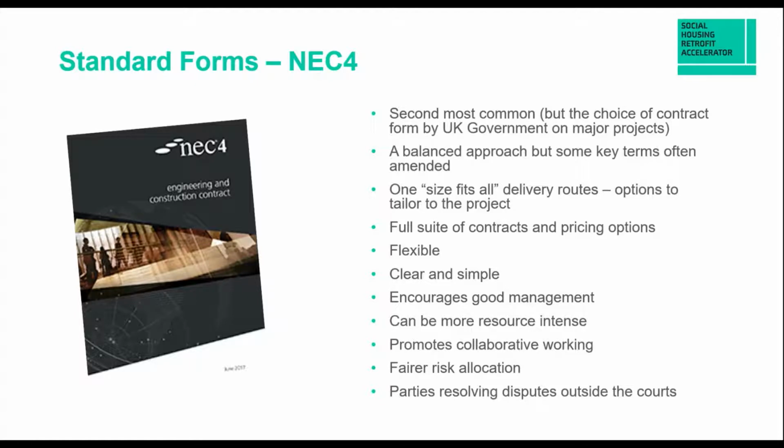It's a flexible contract, down to the fact that it is flexible in terms of delivery route and can be adapted. It's clear and simple, so it uses straightforward, non-legalistic language. There's several provisions in there which encourage good management, so updates of the programme regularly to reflect the progress of the work, monthly forecasting, and changes dealt with as and when they occur. But you can see from the next bullet down, it can be more resource intense. So I suppose that's the flip side of good management. Just as you have the contractor submitting these monthly forecasts and programmes, you've got to have someone on the client side who's accepting those, responding to that.